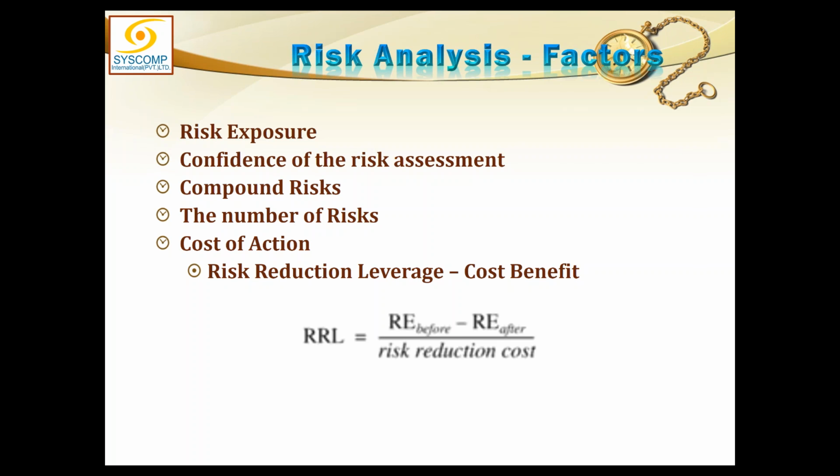Yeah, of course. You see, we are here treating only one factor, and that is cost. Sometimes there are other factors which are more important than cost. For example, there is a human life involved which will be affected. The cost of human life is much more than this 90,000 or whatever we are talking about. So we may spend an inordinate amount of money which otherwise does not look feasible.